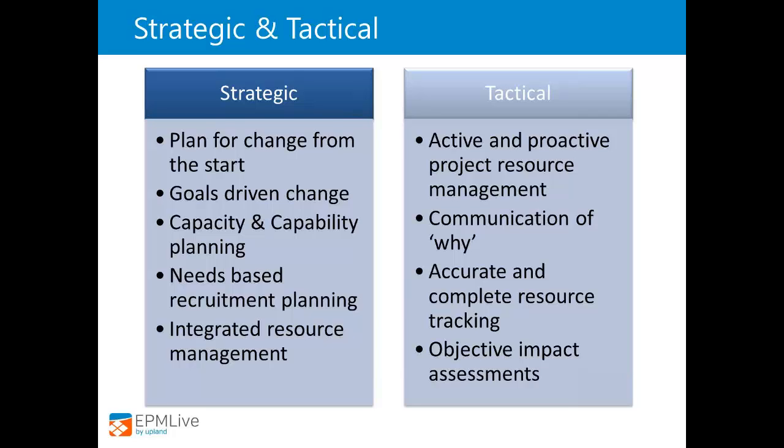And then we need to do objective impact assessments. We have to look at what is happening if we do this change and really understand what's going on. None of these project managers go, sure, we can handle that change, it's no big deal, or on the other side, oh no, we can't handle that change, it's going to be huge, it's going to delay us by months, it's going to cost $1 million more. We have to be objective. We have to look at a change and say, okay, what does this do to us? How can we incorporate it? What has to give? How does the schedule change? How does the budget change? What has to happen for this to work?